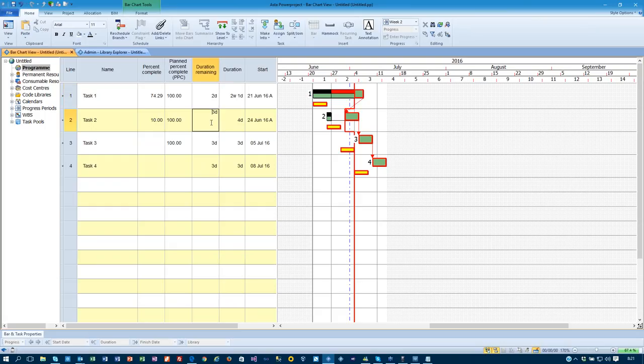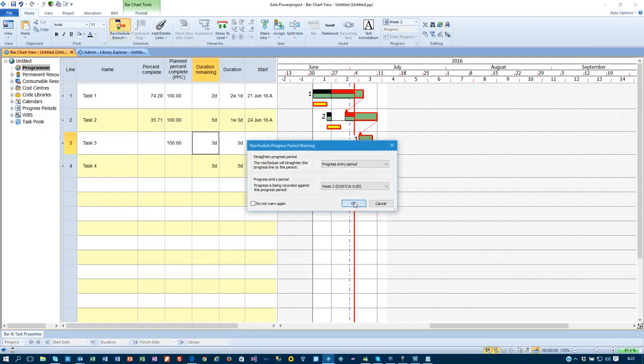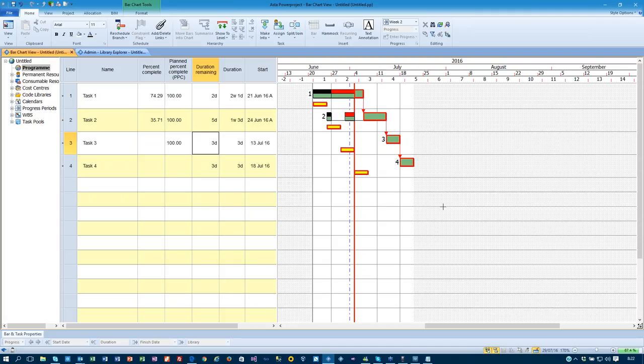This one I can say I need actually 5 days to do, and it progresses that line. I reschedule that project and you can see there, so week on week it will now fill to the line and fill that period, just working on remaining duration for each of my activities that have started, that are in progress. So very quickly we can see this information,